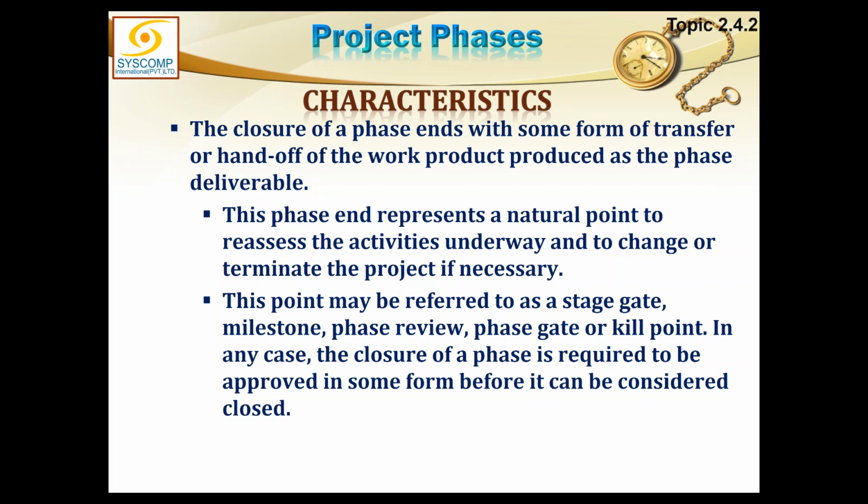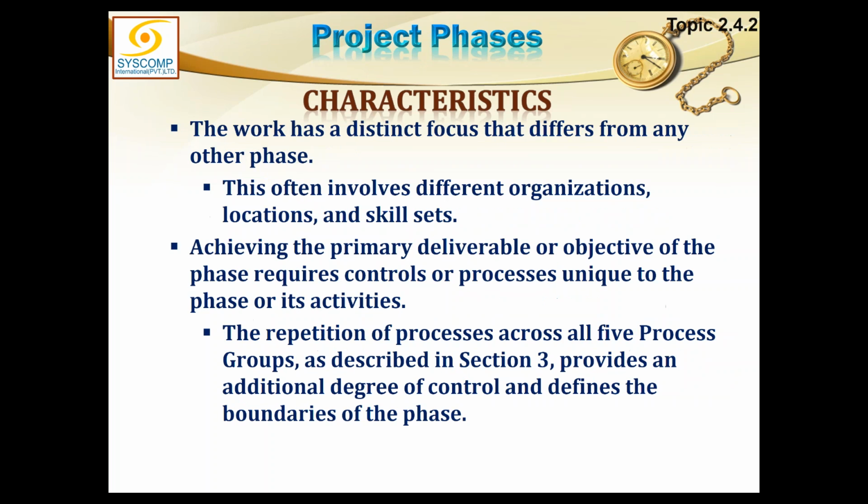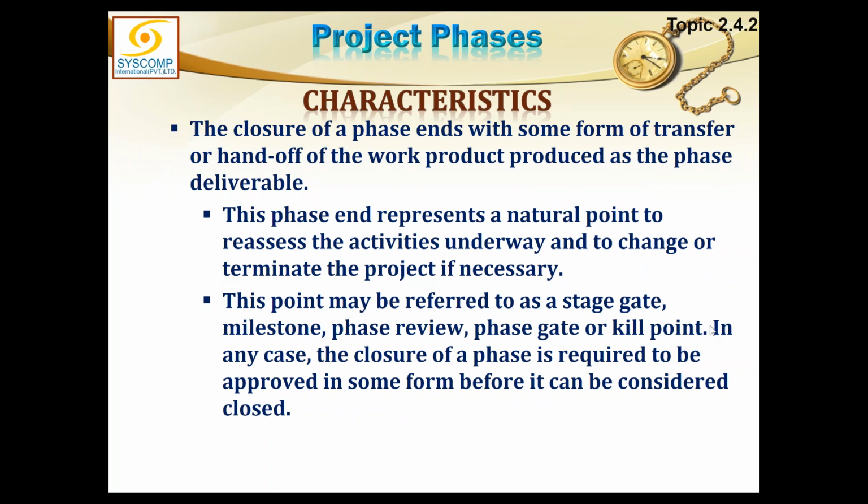The closure of a phase ends with some form of transfer or handoff of the work product produced as the phase deliverable. Phase 1 has completed. The output of phase 1, the deliverable of phase 1, might be the input of phase 2. This phase end represents a natural point to reassess the activities underway. Number 1, it is a transfer and handoff point. The items coming out of phase 1 can be input into phase 2.